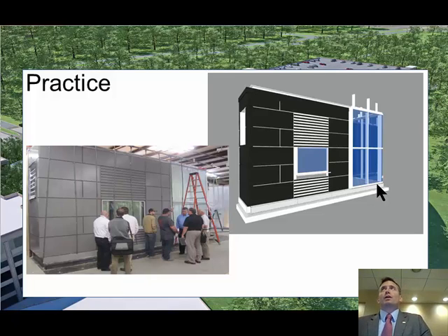The architect and structural engineer had modeled their project. Your MEP design had not done any modeling, and so you had the benefit of model for part of the design. And then when we started pulling the subcontractors in, all those nuances on drawings that are hard to see. You get the superintendents on projects that are just so good at taking those drawings and building it all in their head and seeing what it's going to look like. They'll catch 90% of the issues. It's that other 10% is what I'm really after. And if we model it, not only the superintendent, everybody on the project can see 99.5% of all of the issues, and it becomes very visual.